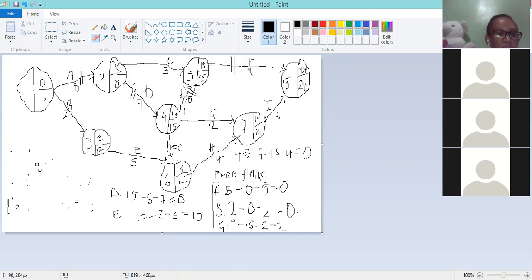again, the considerations as far as the independent floats are concerned, by definition, an independent float is the amount of time that we can delay an activity in the project without affecting the time of a precedent activity, or whichever we call the predecessor activity in the project.